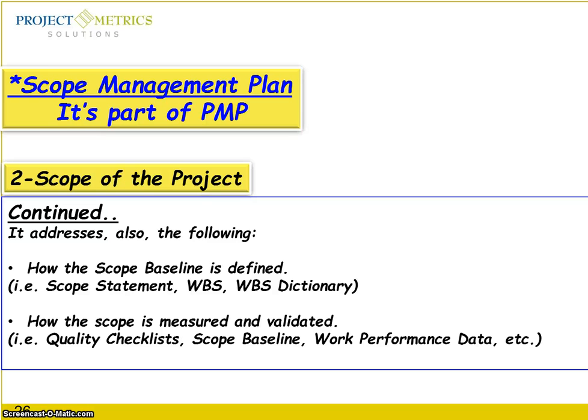It also shows you how the scope baseline is defined. And when we talk about the scope baseline, it talks about the scope statement, work breakdown structure, and its dictionary, and how the scope is measured and validated.